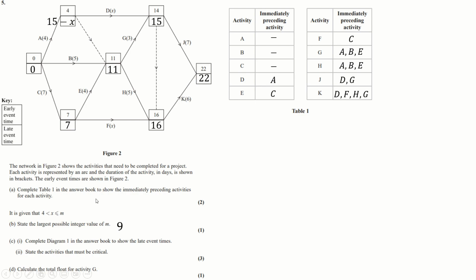And the critical activities are ones such that you have equal numbers in both these boxes, and the amount of time to get from this to this is this value here. So for example, 11, 11 to 16, 16 makes H critical. If it was 11, 11 to 17, 17, H wouldn't be because the distance between those wouldn't be 5. But it is, so that's fine.